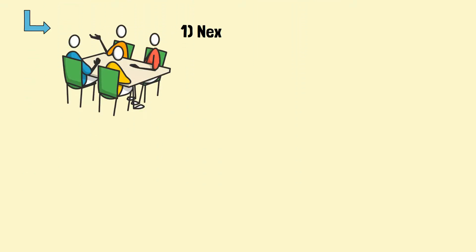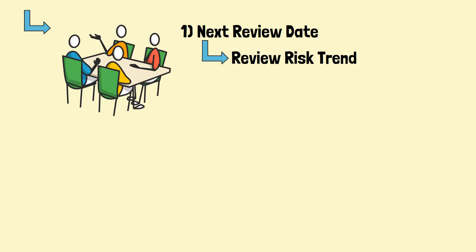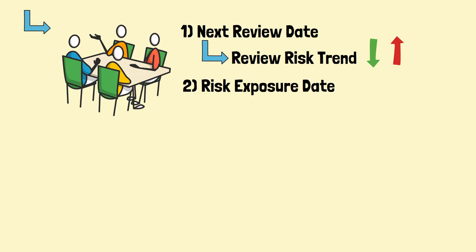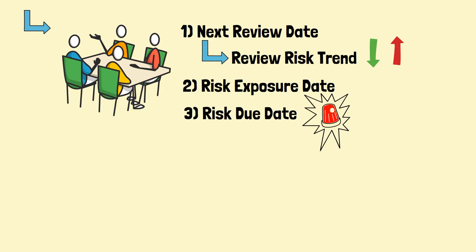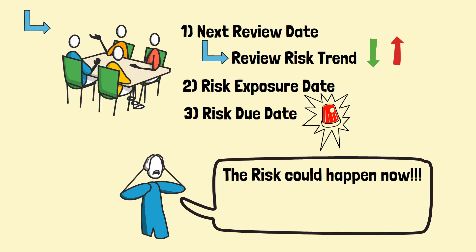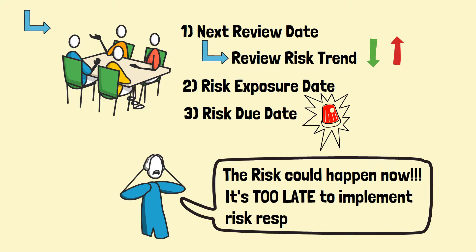The next review date for the risk should be captured in the risk register, with the purpose of regularly checking on the risk status. The risk trend — i.e., improving or deteriorating — is also discussed. If possible, the start date of risk exposure should be stated as well. The risk due date is when the risk will happen, or when the task impacted by the risk will be executed. Any response planned after the risk due date is meaningless.